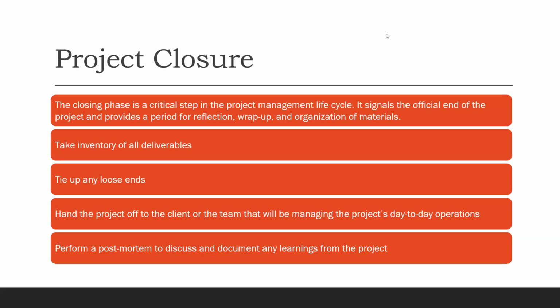I remember I gave an example and said loose ends could be reports not submitted, donors, volunteers not paid, or you skipped some months. It could be vendors not paid. It could be legal issues that have not been attended to. Like in Namibia, for example, when you have a project every year, you must submit tax return forms, you must have proof of what you have done. If you need tax exemption as well, you must submit proof. You must renew every second year certificate of good standing. So those must be there as well.